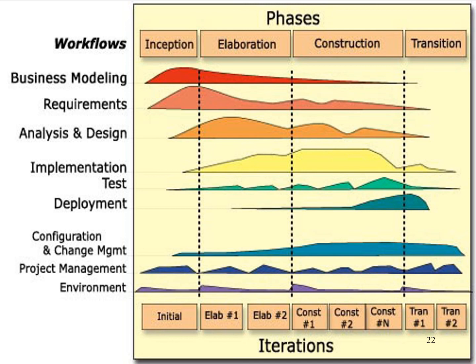And then you move to the second phase, where you can have more than one cycle, right? So you do the same workflow again, but with a different amount of effort and time. If you see a bigger shape, it means a bigger effort and longer time needed to do that. So maybe this is done in two cycles.